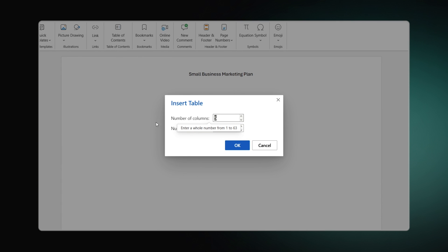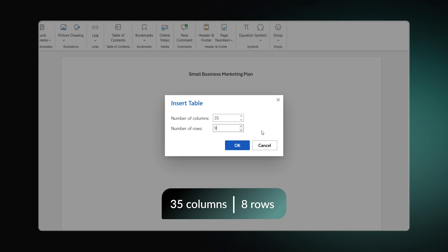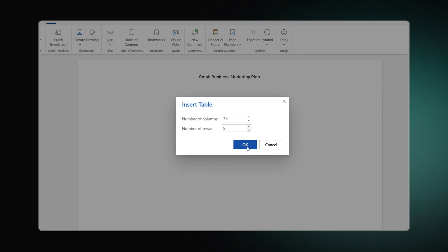Now, here's a tricky moment. You should select the number of cells in the table according to the number of days and tasks in your project. In our case, it would be 31 days and 8 tasks. However, we're going to select 35 columns to allow for the task's name area and 9 rows considering an extra line for the days.